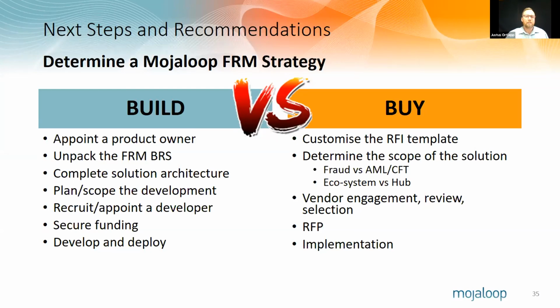You'd have to unpack the fraud risk management business requirement specification or document. You'd need to complete the solution architecture to make sure that the solutions are integrated into the Mojaloop platform. You'd have to plan and scope that development, put together the backlog, and all of this is work that should be driven by the product owner.